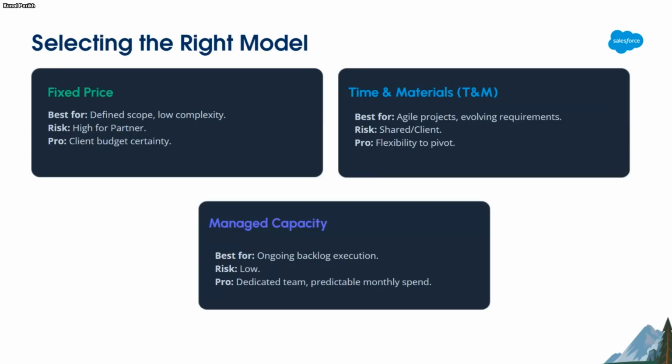This is mainly where, like, in a retainer format. This is more of a retainer thing. This is a win-win for both, because the client has visibility of what they're going to spend. The implementer is also not making losses because they know what scope they have, and it comes in month on month. So overall, the risk is low from both sides, from the client side as well as from the implementer or partner side. But it becomes important which model you select, which estimation technique you select, and depending on that, you arrive at your pricing or estimates.